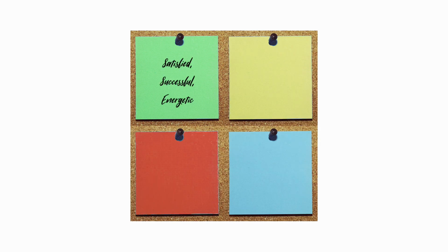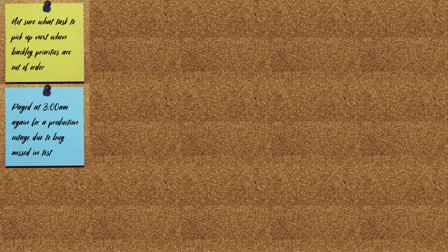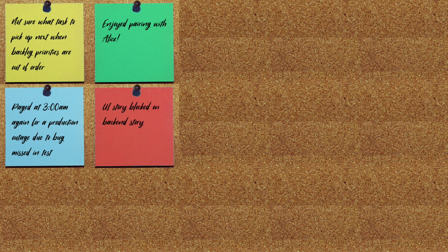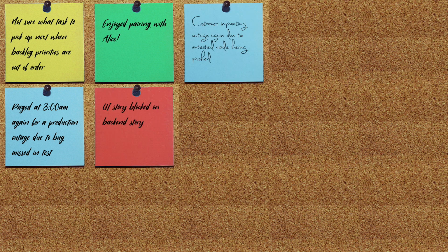I personally like to set the stage by asking a question that the team can answer in a word or two, so that each and every person on the team gets a chance to speak. In the Gather Data phase, I like to get people writing about how they felt the previous iteration went. I get them to categorize their thoughts into one of 4 emotions in a variation of the Derby-Larson timeline exercise and post them on a flip chart. I walk the team through the post-its to draw out ideas and common problems or lessons learned from the past iteration. Each member of the team takes what they've written and puts it on a flip chart, or in this case, pins it to a corkboard. You might instead use software for this if you have remote teams.